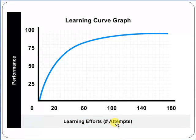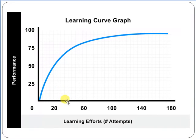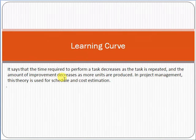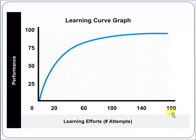Here on this axis is learning efforts or number of attempts, and this axis shows performance units. When we start putting in more attempts, performance units also increase. But after around 140 to 180 attempts, you can see the learning curve becomes stable — it is not increasing anymore. This is the point where the amount of improvement decreases as more units are produced. After 200 or 300, it will start decreasing.